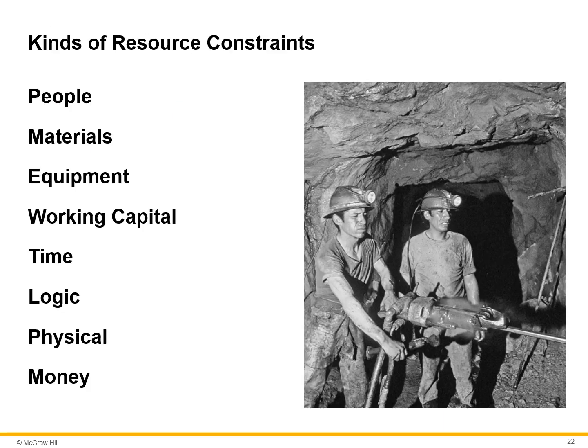The interrelationships and the interactions among time and resource constraints are complex for even small projects. Some effort to examine these interactions before the project begins frequently uncovers surprising problems. Project managers who do not consider resource availability in moderately complex projects usually learn of the problem when it is too late to correct. A deficit of resources can significantly alter project dependency relationships, completion dates, and project cost.